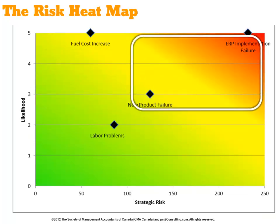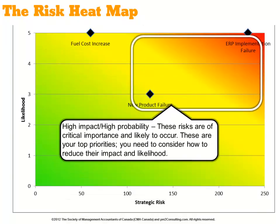On the other hand, the top right-hand corner — high impact and high probability — these are the risks of critical importance to leadership, the board, and your stakeholders, because they're going to have a high impact and are very likely to occur. These must be your top priorities. You need to consider how to reduce their impact, as well as how you might be able to reduce their likelihood.